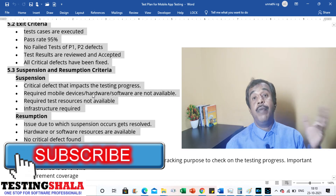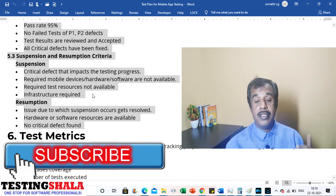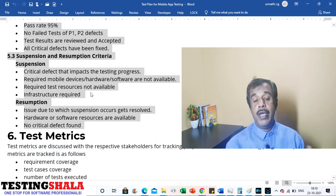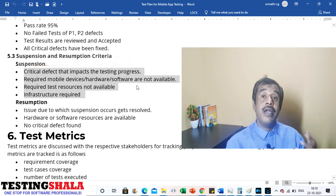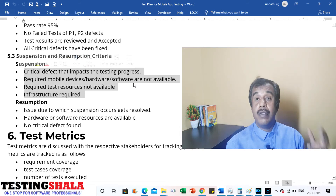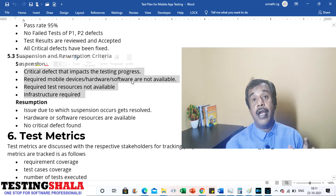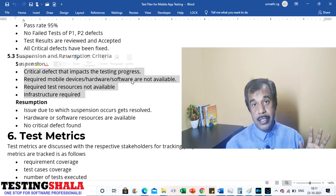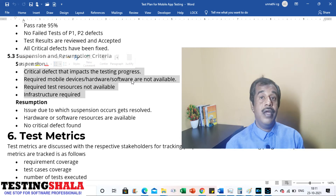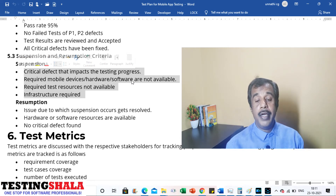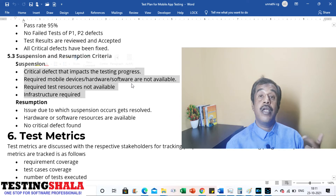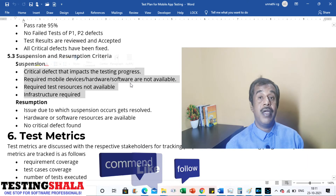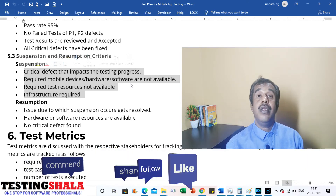We should also document suspension and resumption criteria — when to stop testing and when to restart. During mobile app testing, if critical defects block testing progress, we should stop and inform stakeholders that testing is blocked. Once the issues are fixed, testing can resume. Similarly, if required mobile devices, hardware, software, or automation tools are not available, testing should be suspended with proper escalation, and resumed once all required items are available.